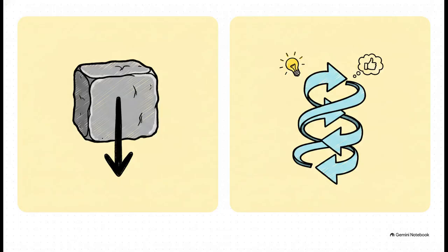Now contrast that with Agile. While Waterfall is linear and relies on fixed upfront planning, Agile is all about flexibility. It's iterative. You work in short sprints, usually 1 to 4 weeks, and you rely heavily on continuous customer feedback. You're constantly delivering working pieces of software and just adjusting on the fly. It's basically perfect for projects where the business needs are evolving rapidly.